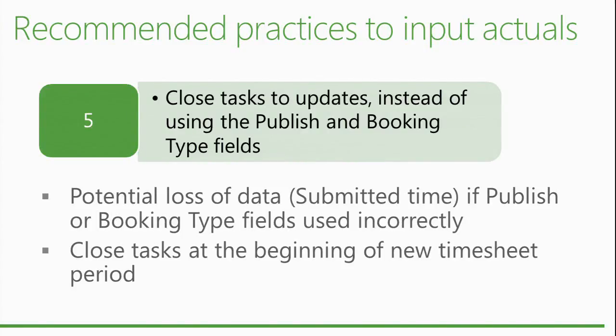But you have no point of using, in this case, the single entry mode because the single entry mode is really meant to automate the process of pushing the timesheet input for the assignments into the task updates that are only assignments. The key, JF, is that she should import them, right? If she's going to do tasks, no single entry mode, and then you can import the timesheet. Yes, so that you don't have double entry.